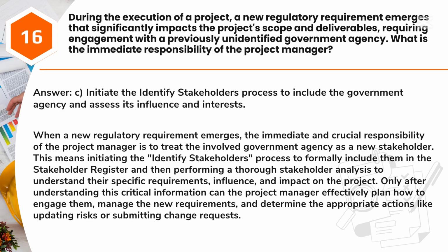Answer: C. Initiate the Identify Stakeholders process to include the government agency and assess its influence and interests. When a new regulatory requirement emerges, the immediate and crucial responsibility of the project manager is to treat the involved government agency as a new stakeholder.